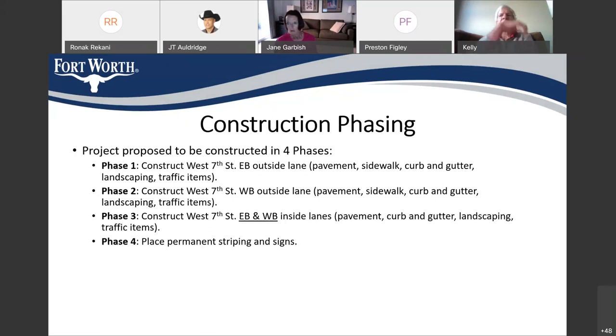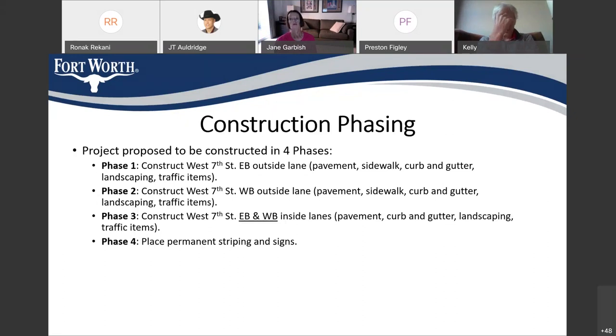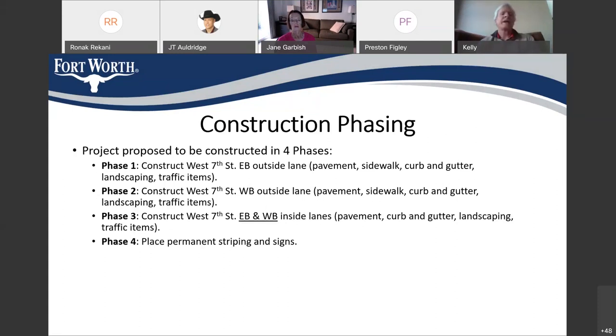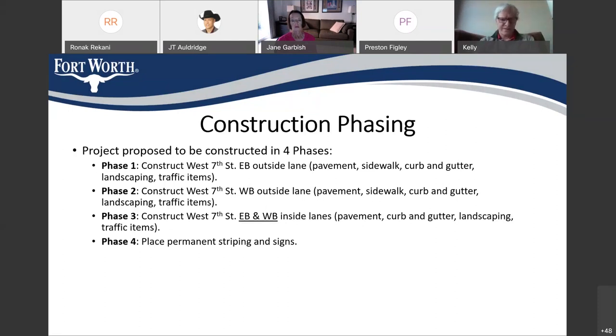The construction phasing, the project will be constructed in four phases. At first, we'll begin on the eastbound side of West 7th on the outside lane. Then we'll be moving into the outside lane on the westbound side, directly opposite. And then construction will move into the two inside lanes, the eastbound and westbound inside lanes. And then we'll do the permanent striping and signage along the streets.